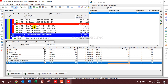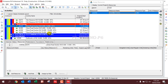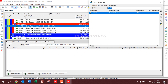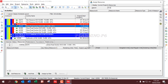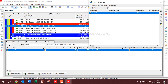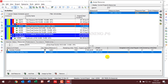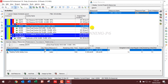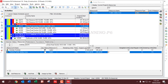Next we go down to the 'Close Road Section' activity and assign resources. We need one resource — let's say a foreman — with ten units. Then Traffic Safety Crew with thirty units budgeted.